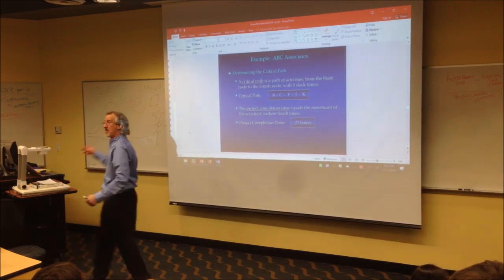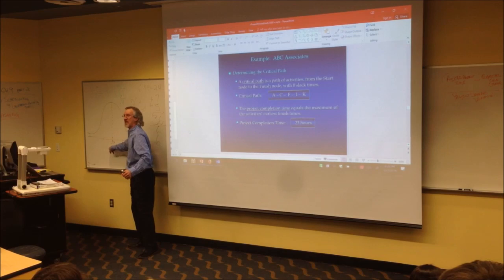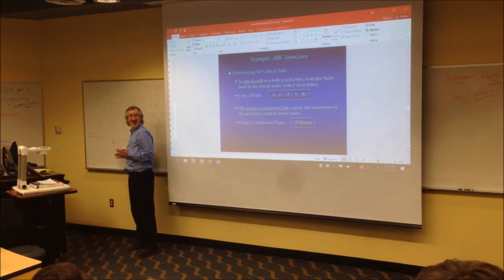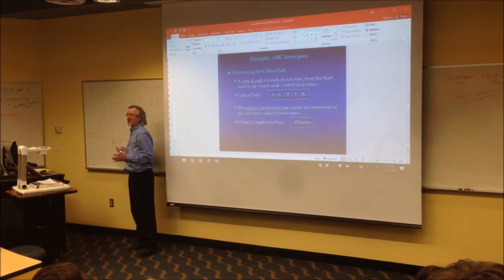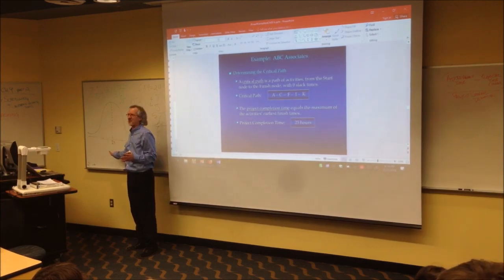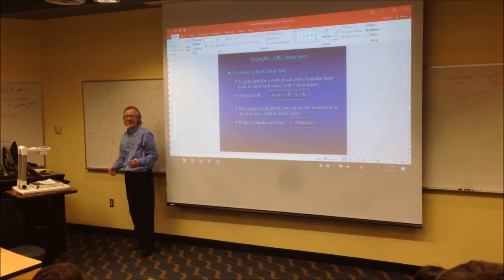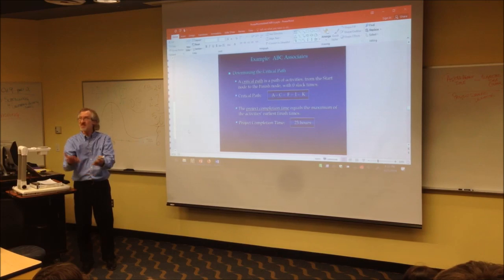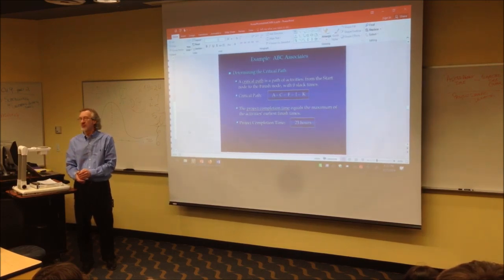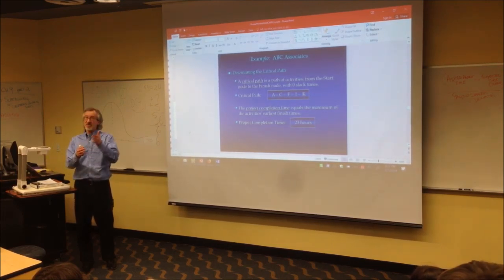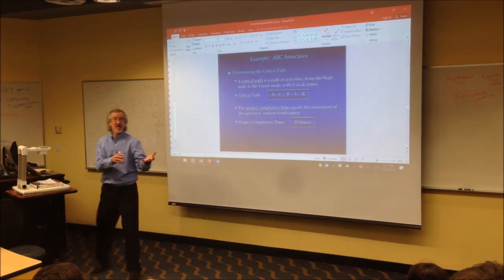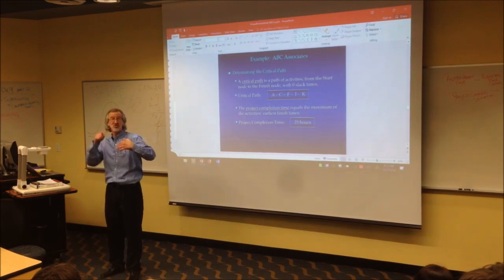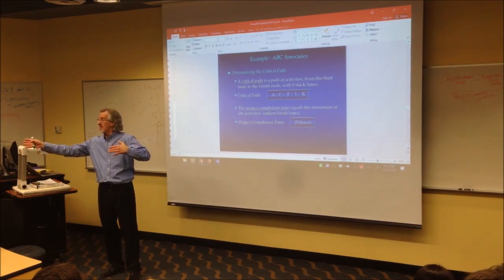And if I said to them, yeah, we're going to be done in 23 days, they see that this is an uncertain activity time project. They're going to say, you only have a 50% chance of getting done in 23 units of time. We don't want to lend on that, because every bank that's done commercial loans knows that you as a borrower are depending on the revenue from that project to start paying the principal on that loan. That's the whole point.